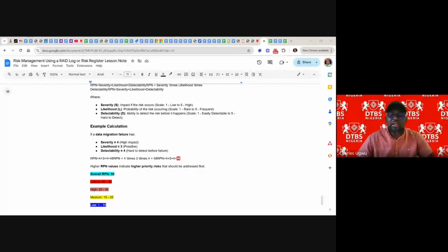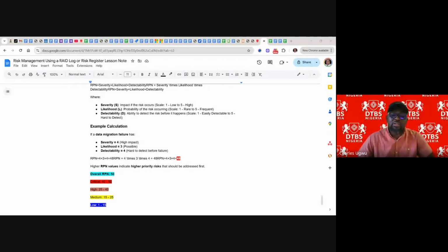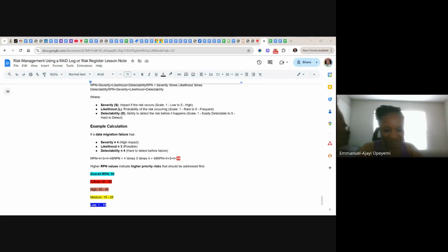You must dedicate one day in a week to capture new risk and to address the one you've captured. It continues on and on until finally the project closure report is written, and that is when it's going to end. Okay. Thank you, sir.